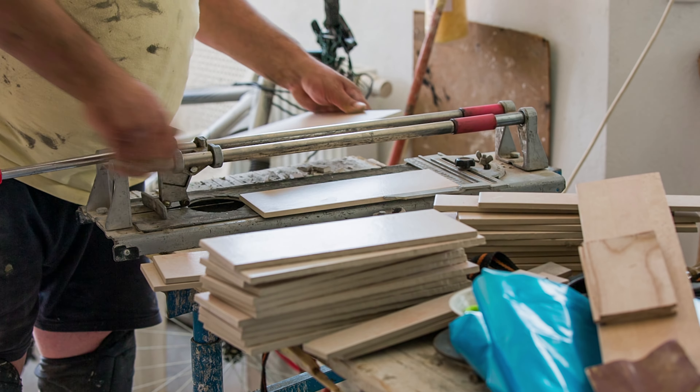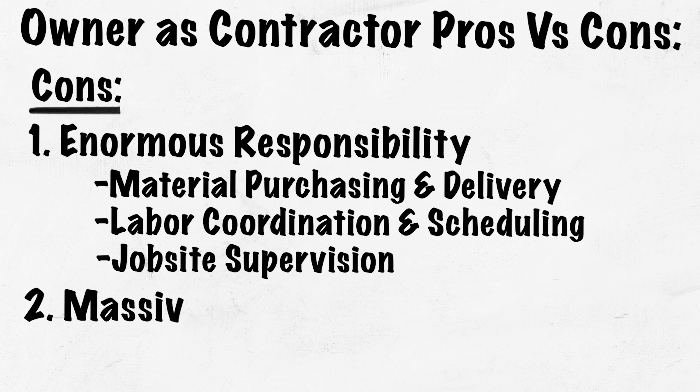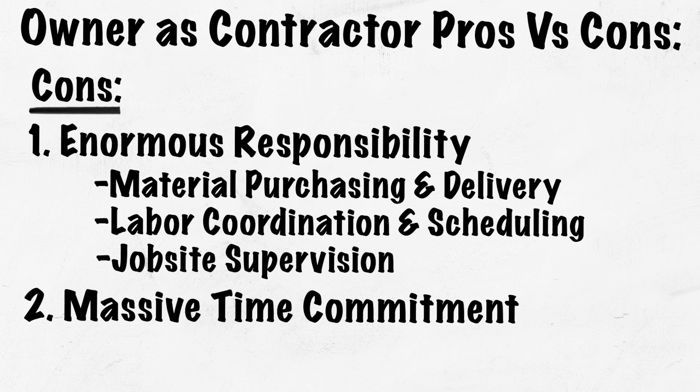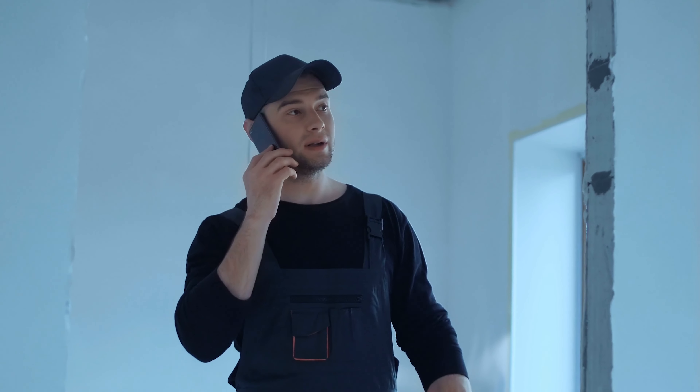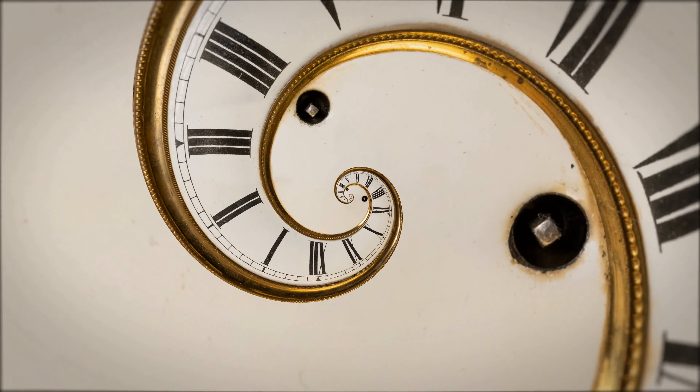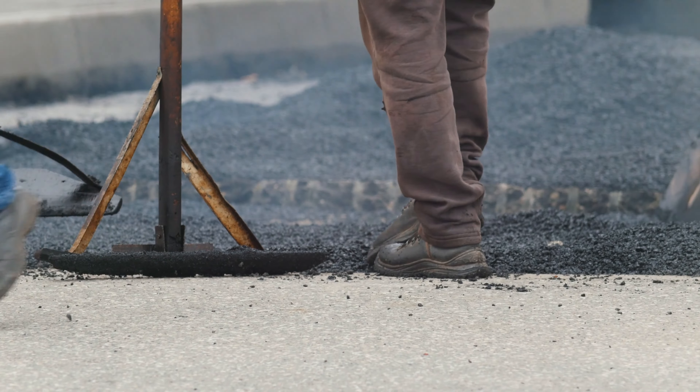This approach is done when the owner has some experience in construction — it should not be advisable to somebody doing it for the first time. It is a huge time commitment because you have to make sure subcontractors show up and coordinate schedules. For complex projects, we definitely do not recommend it. But for smaller projects, many small commercial business owners will do it because they may already have a labor force and know other subcontractors, allowing them to assemble a team of tradesmen.